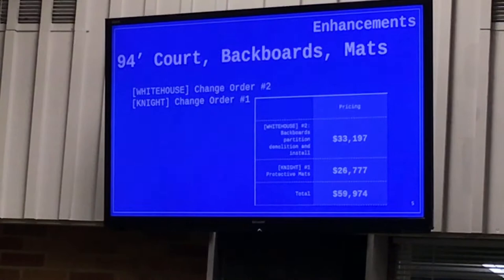You can see the pricing of the change orders here. Change order number two would be the second change order through White House, and that would have a cost of $33,197 to install the new backboards and remove the partition. And then to add the protective mats with insulation would go as a change order to Knight at